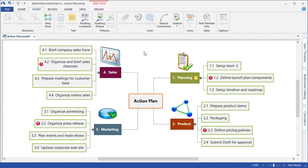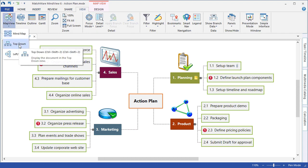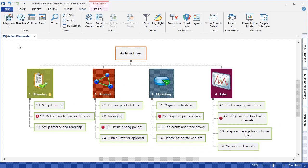As we continue building our action plan, it is now time to switch to the Work Breakdown Structure view. As we choose the View tab, we can select Map View and learn how to create the WBS. By left-clicking top-down, the mind map is automatically converted into that top-down or work breakdown structure view, with each individual stage or phase included as a main level branch and the corresponding subtopics.